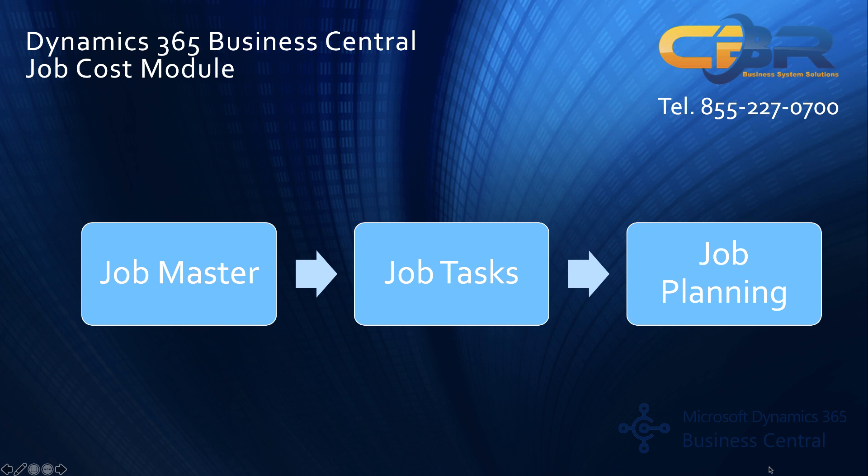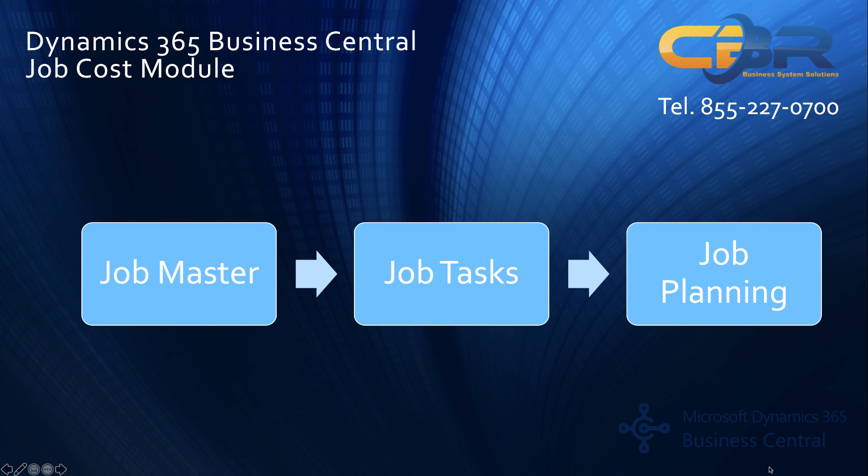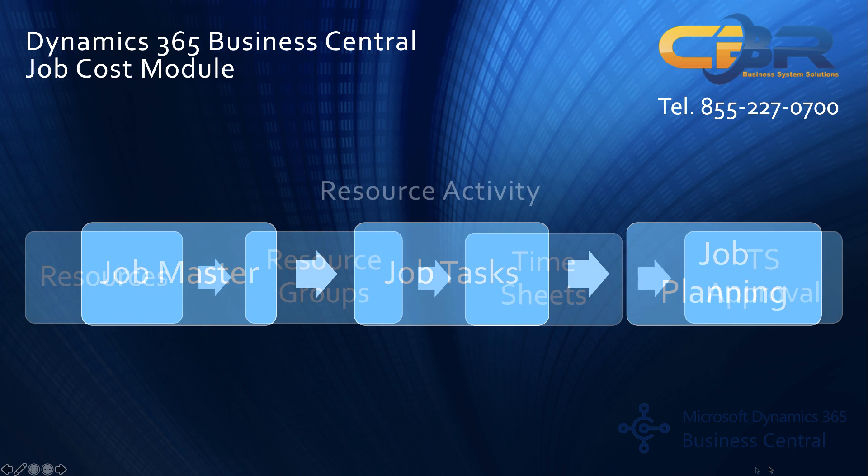Inventory basis means you can allocate specific inventory items to a job or project and make them part of particular tasks as well. The job planning line is also for budget purposes however if you're not planning and using budget versus actual analysis as part of your job costing system configuration the job planning may be limited to other parts that don't include budgeting.